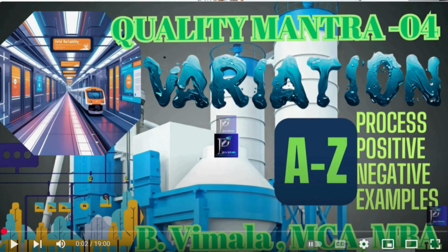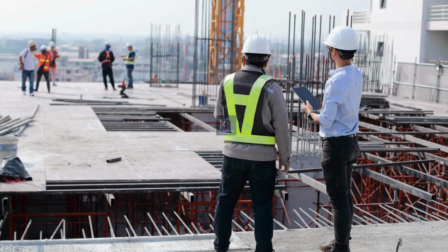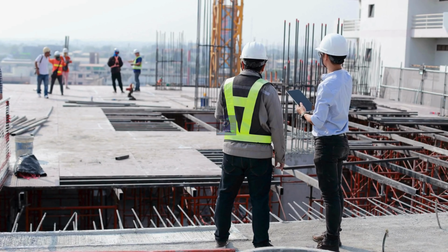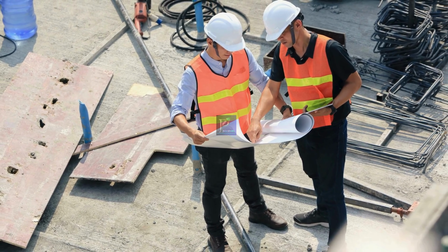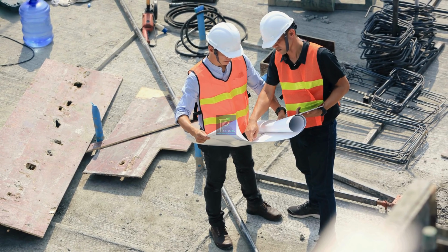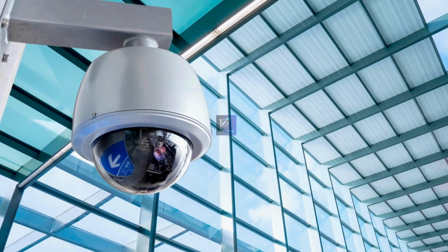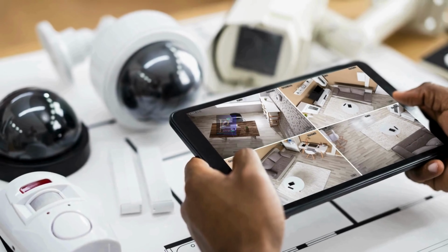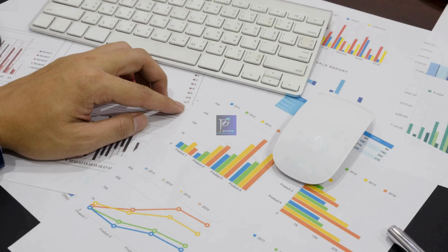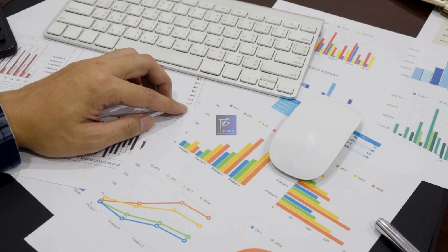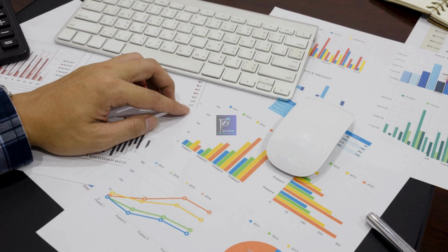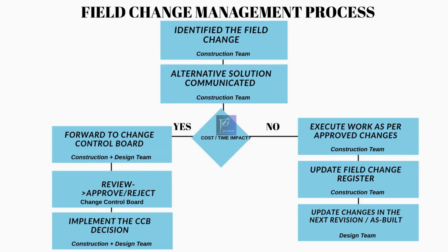Right? Because on site, due to ad hoc schedules, most field changes are approved at the site level, which I feel is necessary. It cannot be dragged through the approval process. But the approver has to ensure he coordinated with the right stakeholders like the design team to ensure it does not have any impact on the structure. Okay? It depends, like if changing the camera, it's not going to make any changes. So the quality manager must ensure that appropriate procedures and relevant formats are developed and used by the team. The process should clearly define how field changes are managed on the project.